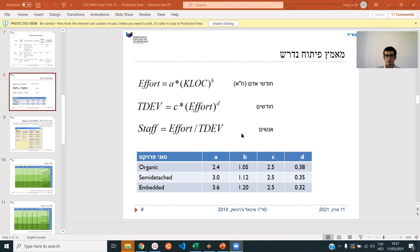So first we convert to figure out how many months it should be, then we figure out how many people based on the months and the effort. How do they get these numbers? Basically from analyzing past projects — how big they were, how long they took, how many people they took, and which ones were successful.